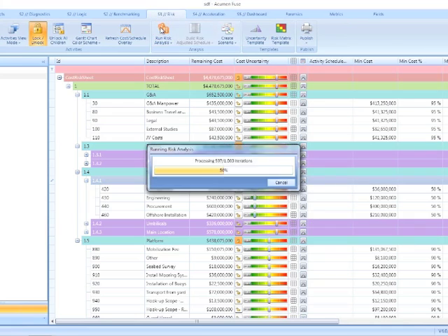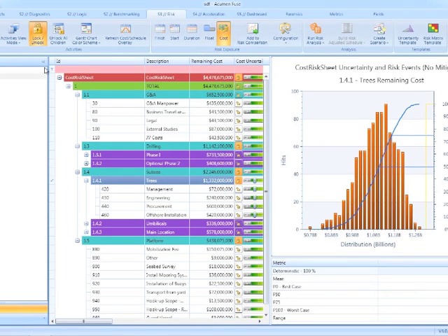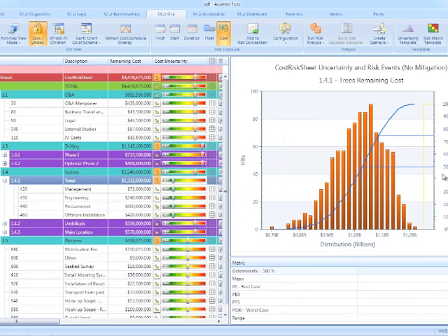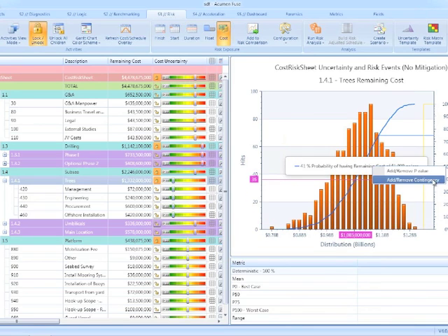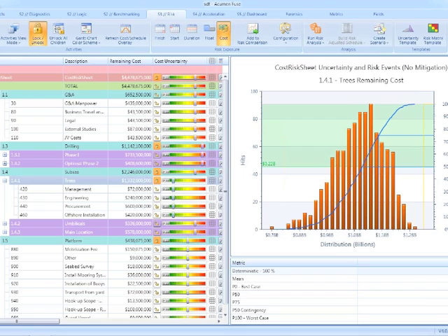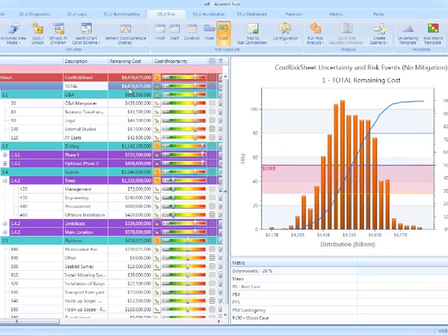At this point, we could run our cost risk analysis, and in the same way that we reported contingency and drivers earlier for schedule, we could do exactly the same thing for cost. Actually, this is quite interesting, because what it's showing here is that for the trees, there's too much cost baked into the estimate already. Let's go back to the total project cost, which is sitting at $4.5 billion. So our contingency right now is $60 million.